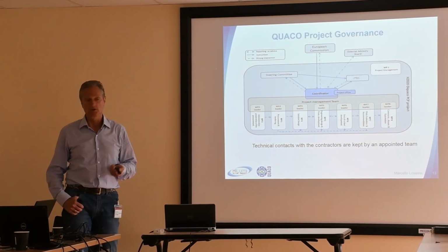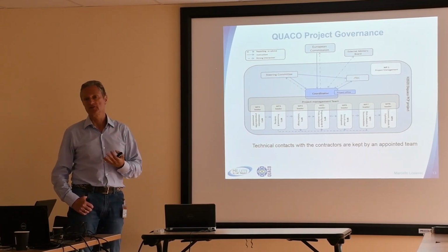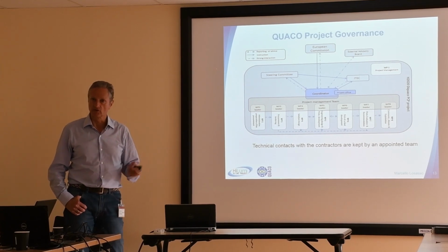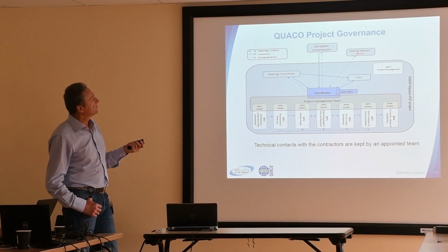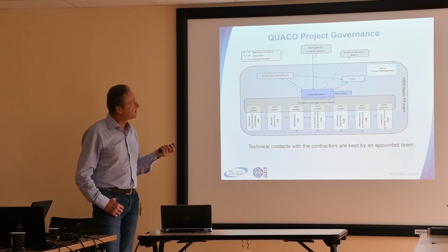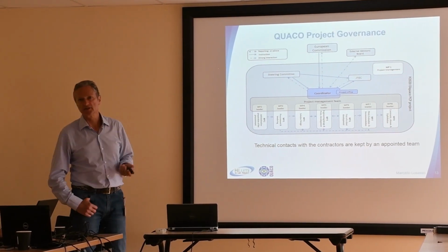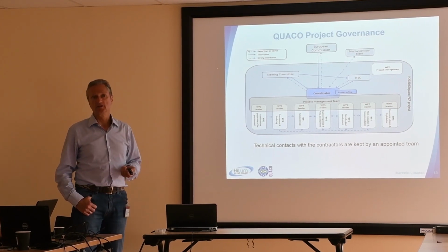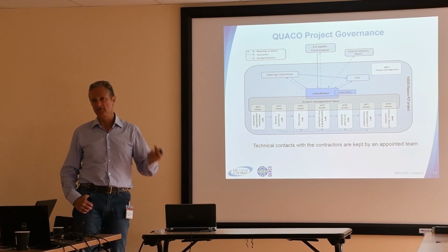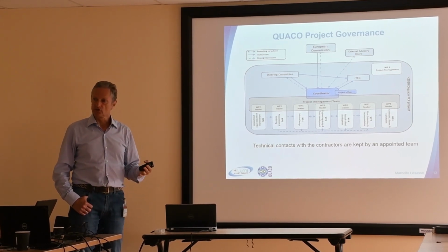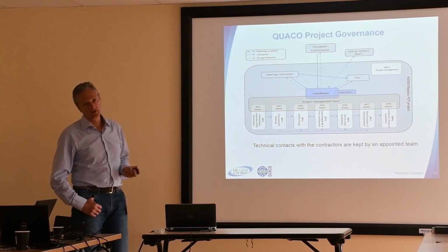I think this is what we did, and also you need to have representation that is balanced in terms of qualification. You need technical but also administrative people there. Then we had also an external advisory board. This is an external board of reputed scientists and administrators that once per year or once every 2 years makes a review of the project, and then makes recommendations to the coordinator and to the steering committee.